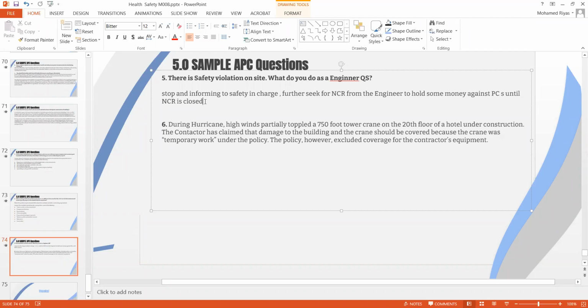But if the workman challenges in court, or in arbitration, that the damage happened due to the subcontractor who is appointed by the client, who has a direct contract, and says, because of his negligence I got damaged and I lost my leg, my hands, what will happen? There's an indemnity in the policy in FIDIC. The main contractor makes sure he is providing indemnity to the client, and the client will not pay any legal expenses. But if the insurance company, the workman compensation, doesn't indemnify, what will happen?